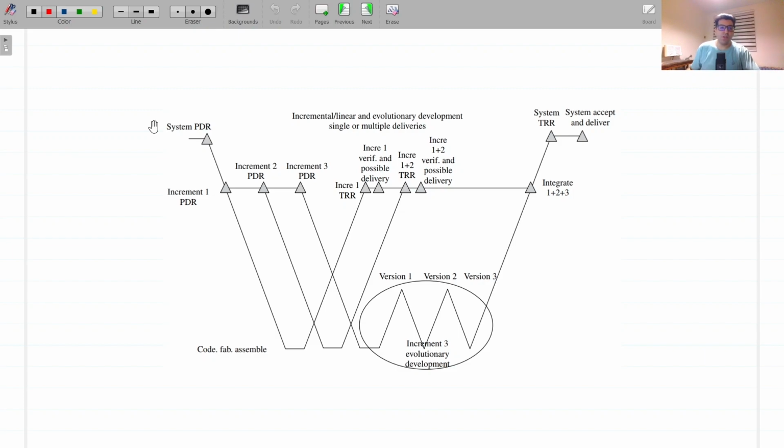The IID approach is used when the requirements are unclear from the beginning or the stakeholder wishes to hold the SOI open to the possibilities of inserting new technology. Based on an initial set of assumptions, a candidate SOI is developed and then assessed to determine if it meets the stakeholder needs or requirements. If not, another evolutionary round is initiated, and the process is repeated until a system is delivered to satisfied stakeholders or until the organization decides to terminate the effort.